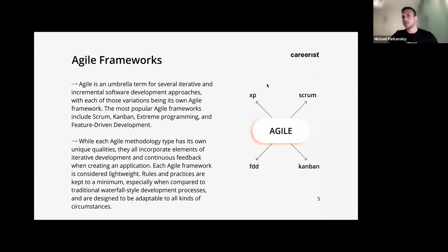Is it because some circumstances are fixed, which is why it requires the waterfall approach? Yes, where requirements are fixed, it will be successful. Waterfall is used in more regulated places, in government agencies. For example, when you're building software for the military, they have specific specifications that you have to meet, and it has to be approved. And that's why they use the waterfall approach.